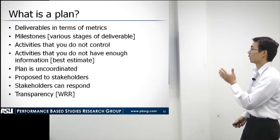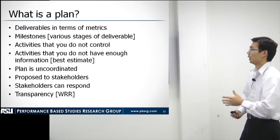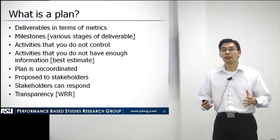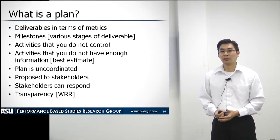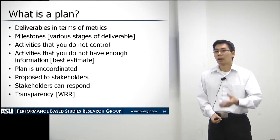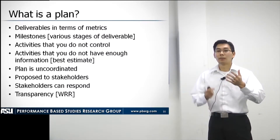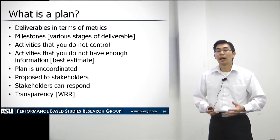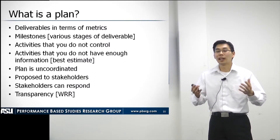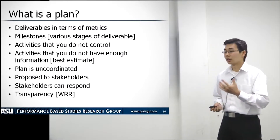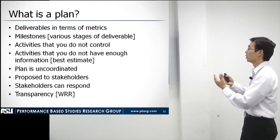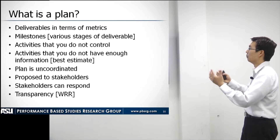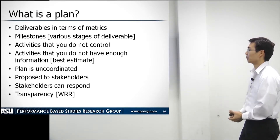We will want them to outline activities that they do not control and how they will mitigate any risk in those activities — such as someone not being coordinated with, waiting on an outside entity, or having an outside entity approve a certain item. We will want to know exactly how they will coordinate that and how they will mitigate any risk of that being a problem.